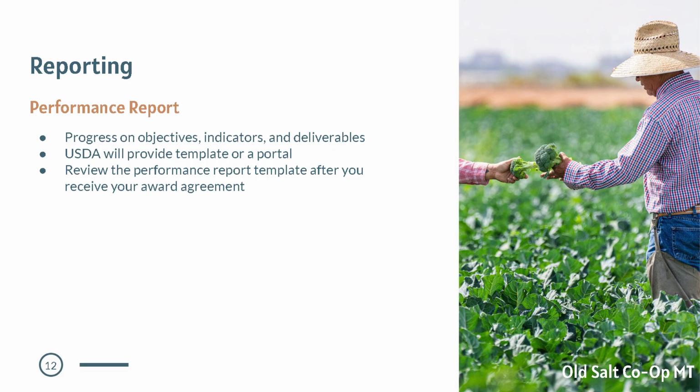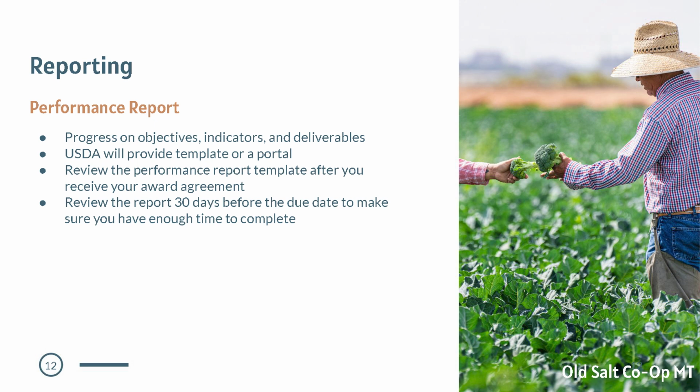It's a good idea to think about how you can set up tools or tracking systems early on to capture the data you'll need for these reports. The sooner you start tracking, the easier it will be to gather the necessary information when it's time to report. We recommend you review the performance template at least 30 days before your first report is due. This will give you enough time to gather data and complete the report thoroughly without feeling rushed.